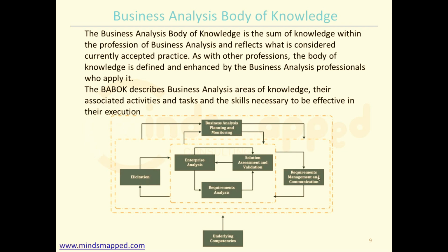You can see that requirement management and communication keeps going on all the time. Requirement management is all about your change requests, which we were talking about, and controlling, if you remember. If any new requirement comes up, we again have to do the elicitation and the requirement analysis, and check whether the new requirement is as per your business case or not. If it is not, then there's no need to provide that solution. If something is out of this scope, it would be treated as a separate project itself. That's the reason for requirement management in combination. Obviously, we have to communicate all the time when dealing with all this, so that also needs to be taken care of, and everything is monitored and planned by a business analyst.